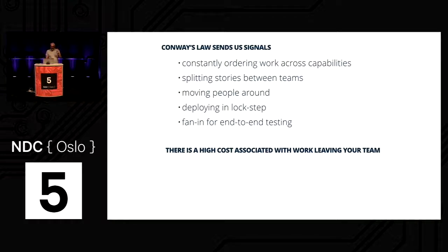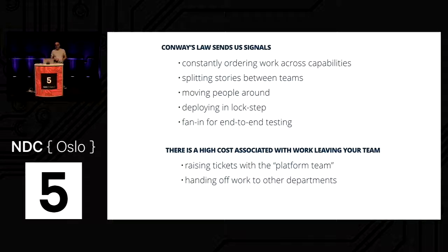And finally, high cost associated with work leaving your teams. So if you're raising tickets all the time with a platform team, right, that's going to impede your progress. It's going to slow you down. Handing off work to other departments, order of magnitude increase in cycle time. And if you're constantly having to start and stop projects, that's another high cost.